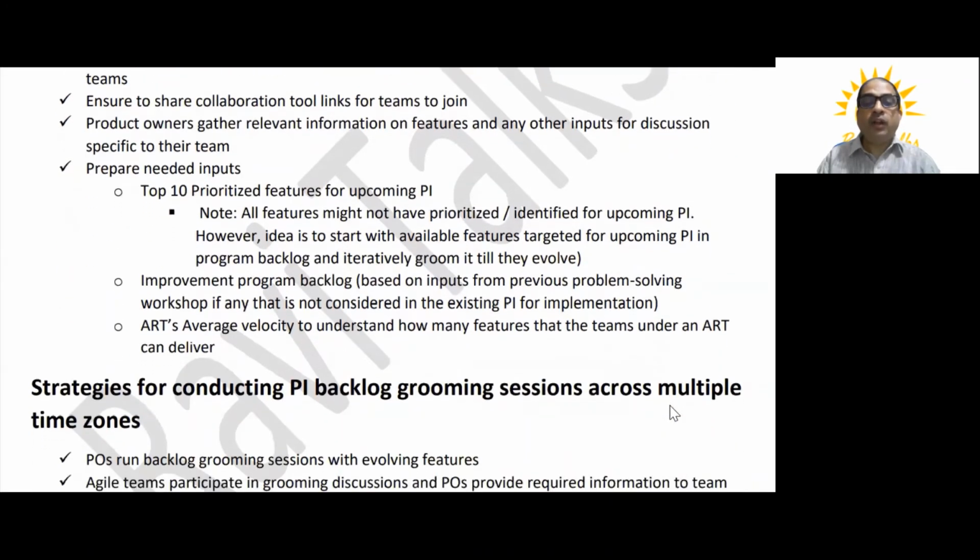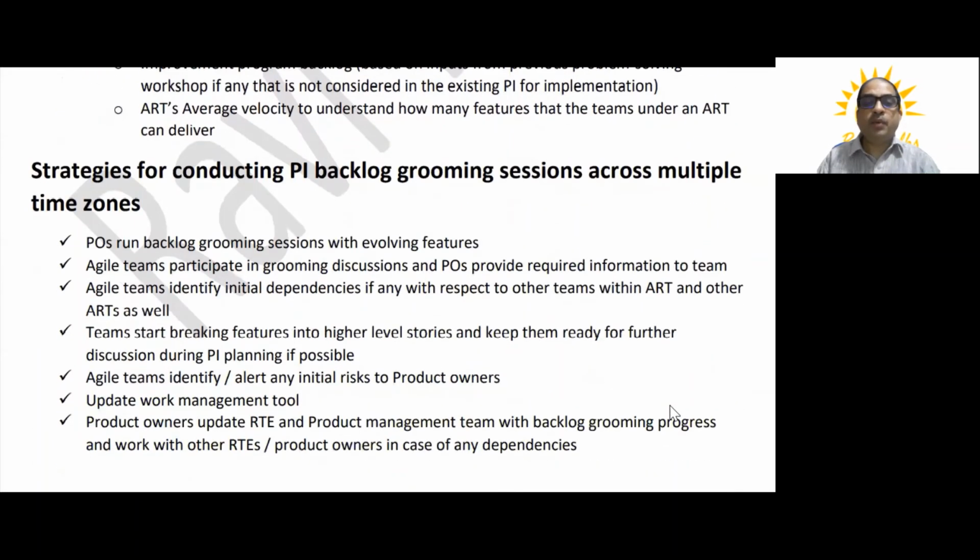Okay, and the most important thing, the various strategies for conducting backlog grooming sessions across multiple time zones include the following. Even if we don't have all the requirements and understanding of all the features when we start the backlog grooming sessions, that's fine. But my recommendation is to start feature backlog grooming sessions at least in the fourth or fifth iteration of the existing PI, and probably every week allocate 1 to 1.5 hours.